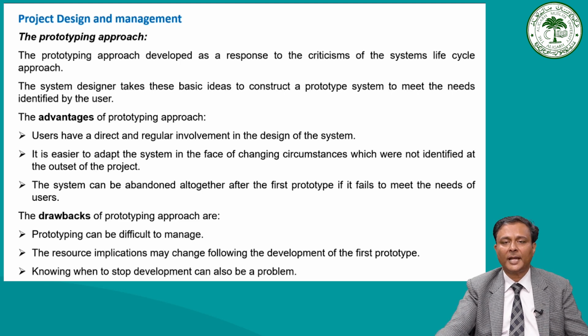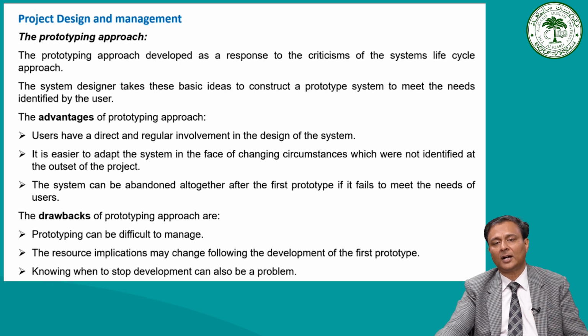So, the prototype approach has advantages over the system life cycle methods on several counts. For example, first, users have a more direct and regular involvement in the design of the system. It is easier to adapt the system in the face of changing circumstances, which were not identified at the outset of the project.